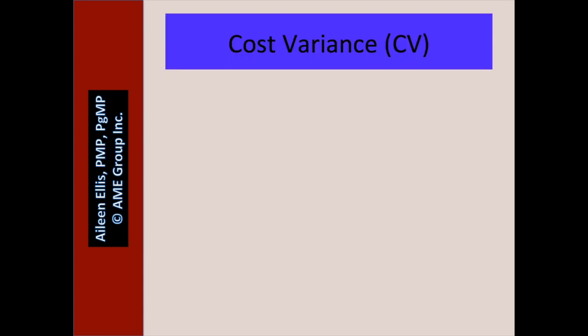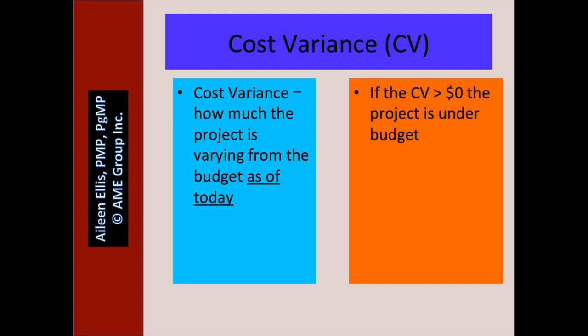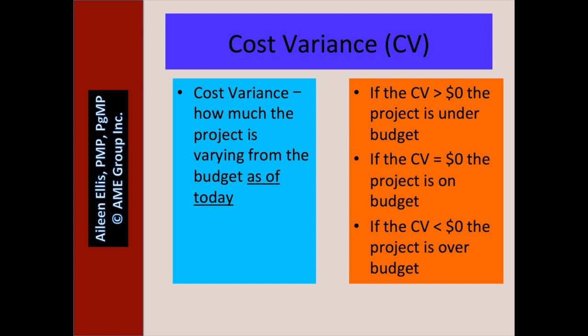We're going to begin with cost variance. In my own words, cost variance is how much the project is varying from the budget as of today. If the cost variance is positive, the project is under budget. If the cost variance equals zero, the project is on budget. And if the cost variance is less than zero, the project is over budget.